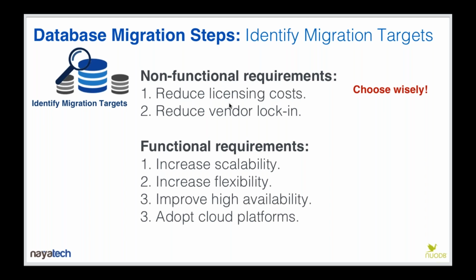So migrating a specific SQL Server or Oracle database to another database platform could be, for one database, an easy and relatively fast project, but for another database could be extremely complex. And we'll see what affects that in a moment. But it's very important, if you're coming to the database migration project from a business perspective, to pick and choose at least the first database you're going to migrate wisely, so that you can get success fast and show value in your organization relatively quickly.